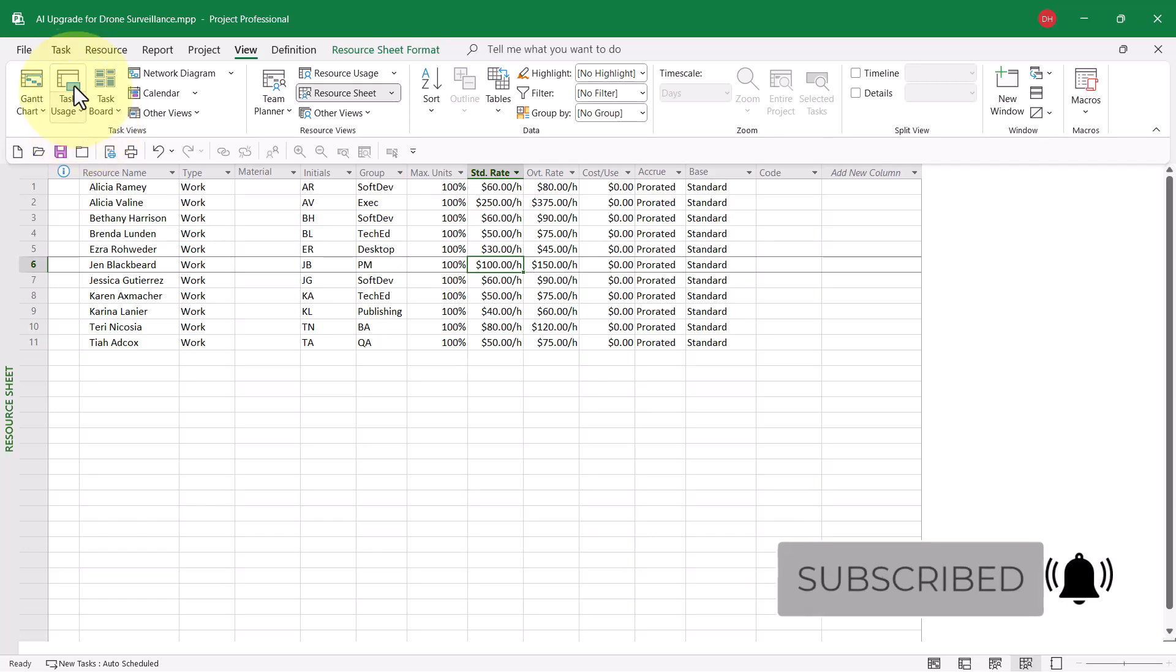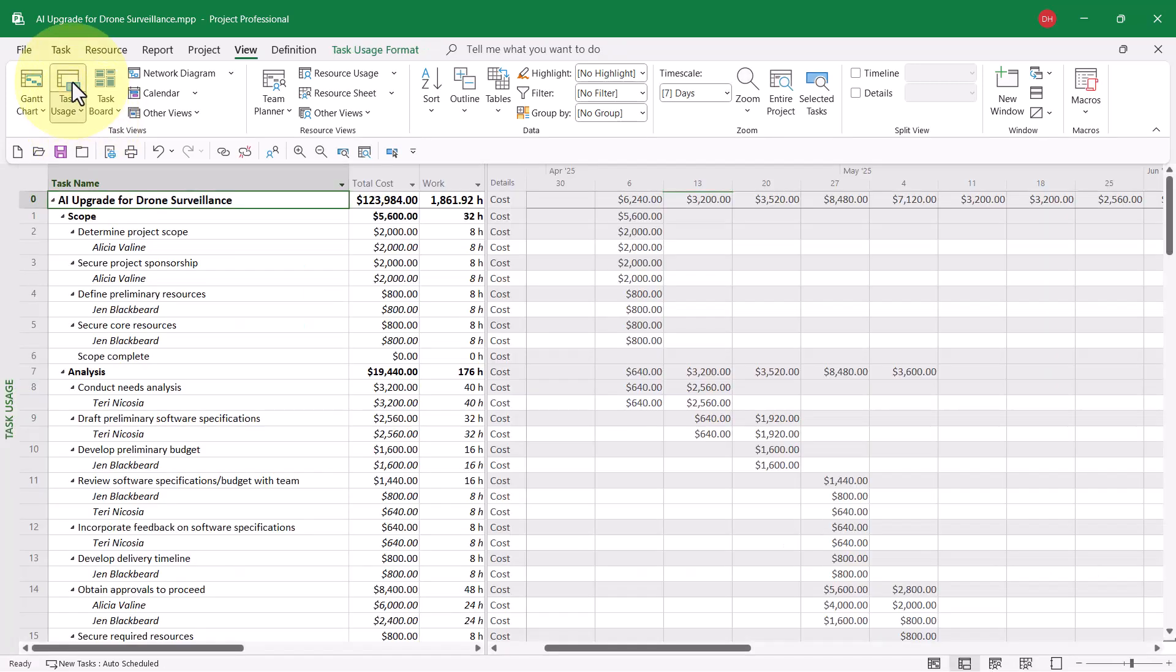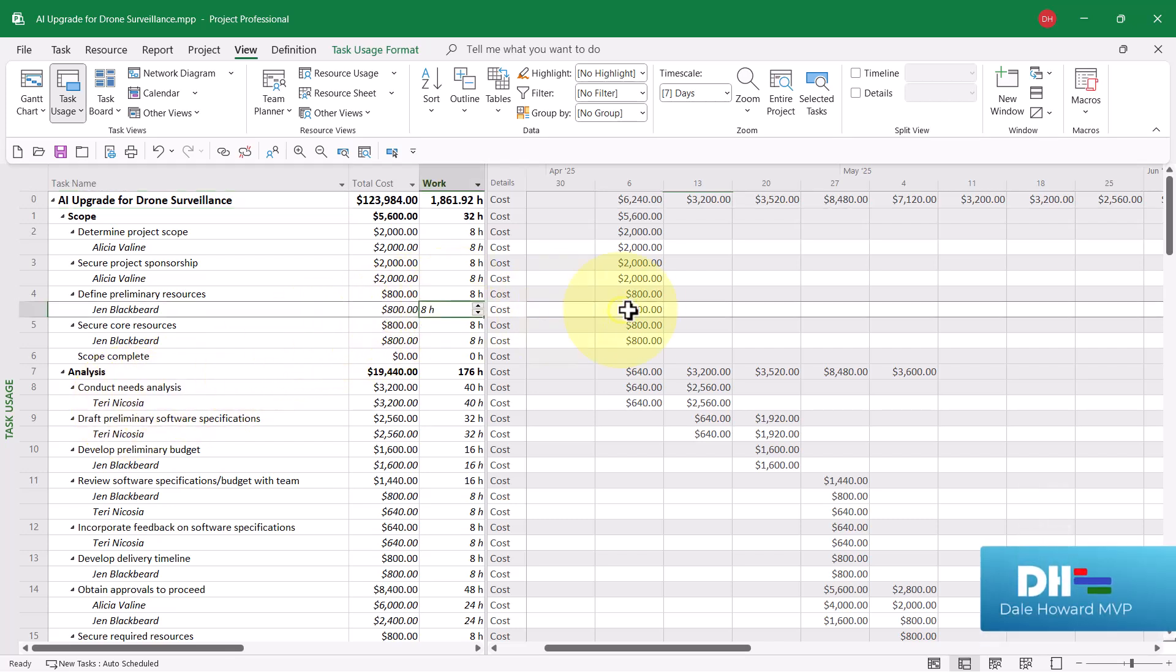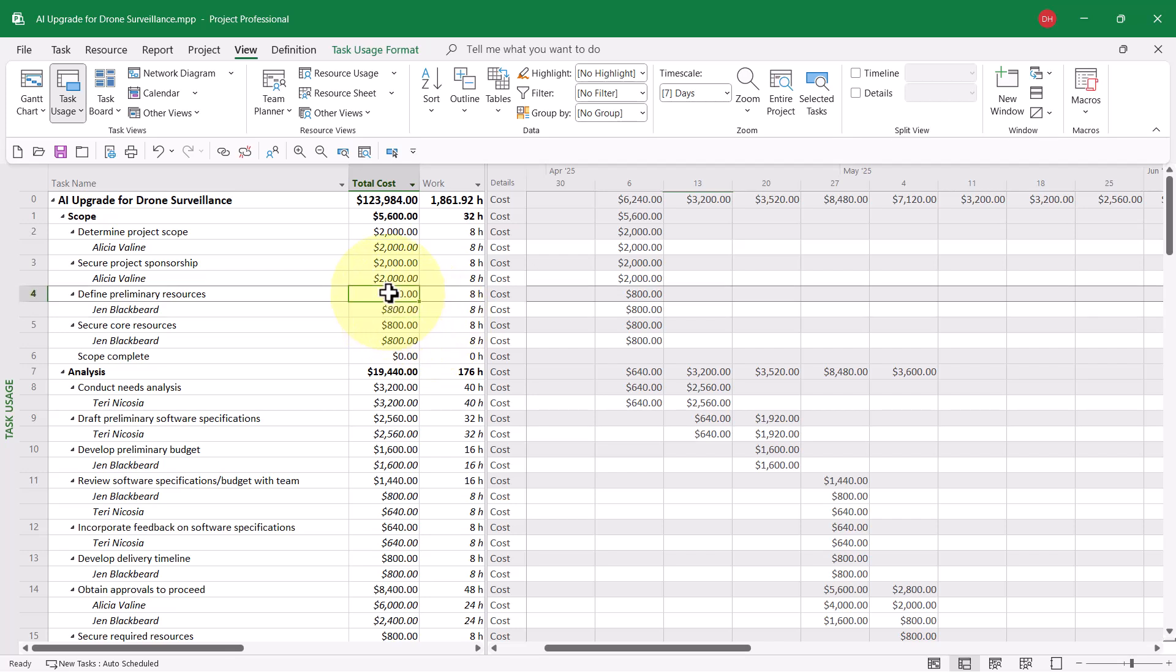Now, let's go to the task usage view, which I've customized a bit so you can see clearly how costs are calculated. Notice that Jen Blackbeard is assigned to the task Define Preliminary Resources. She's assigned to work 8 hours on this task. 8 hours times $100 per hour is $800 for her assignment, which then rolls up to the task itself as a task cost of $800.